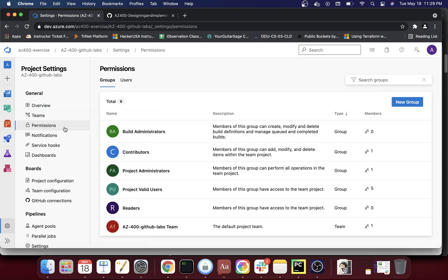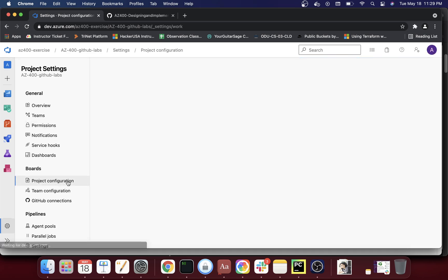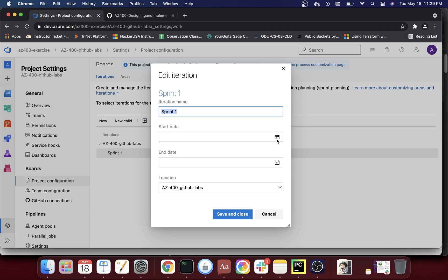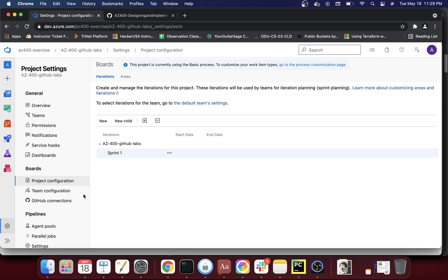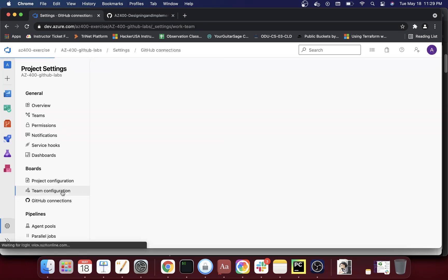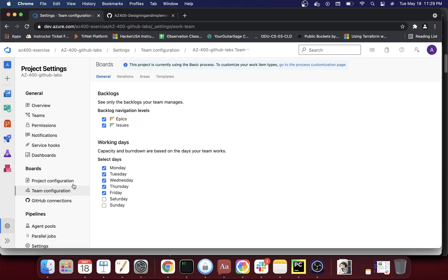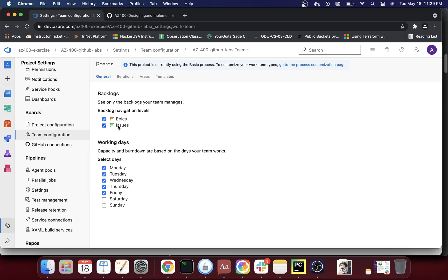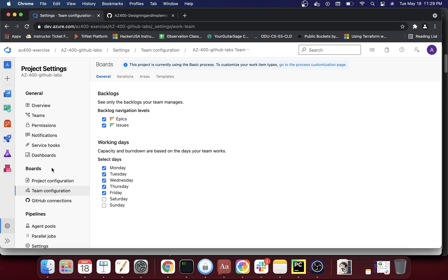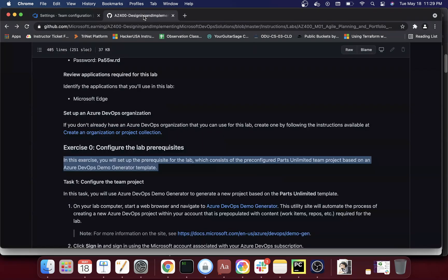Under Teams, a default team was created called 'az400 GitHub Labs Team.' You don't need to worry about permissions for now. Under Project Configuration, you can see it created one sprint. You can configure the sprint start date here. You can also configure the team's working days — if you work Saturdays and Sundays you can turn those on so burn-downs calculate correctly. If you're using epics and issues, turn them on here.